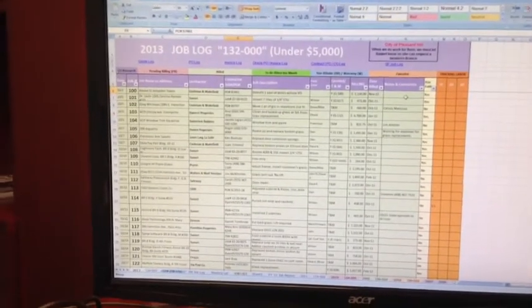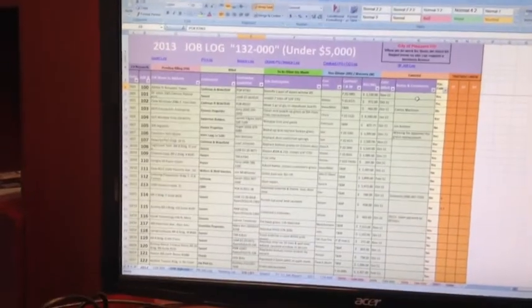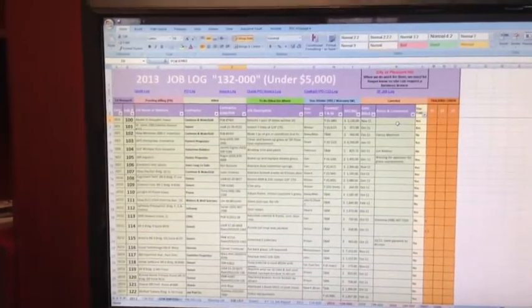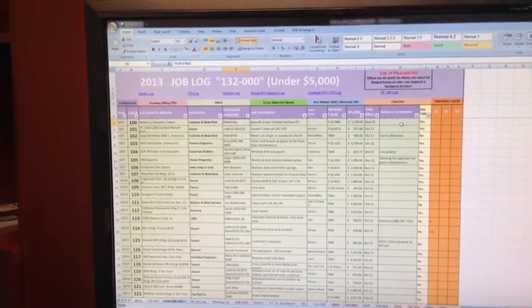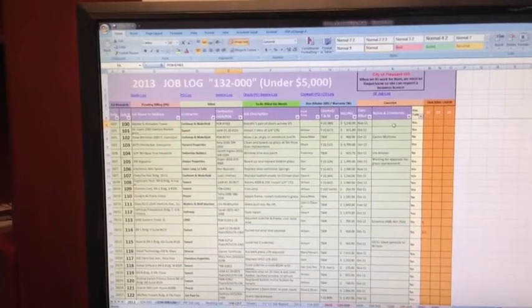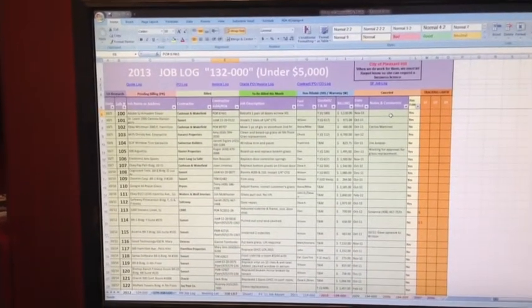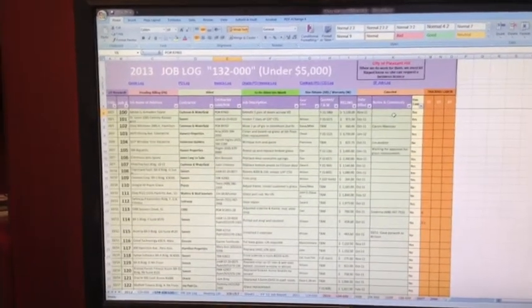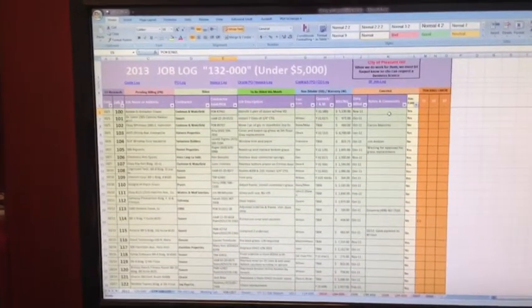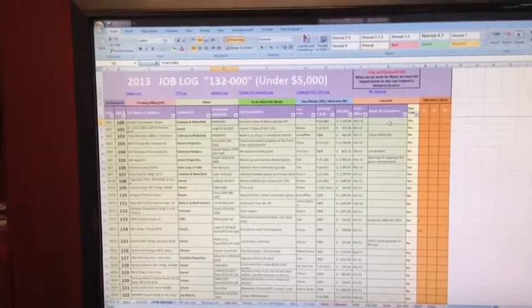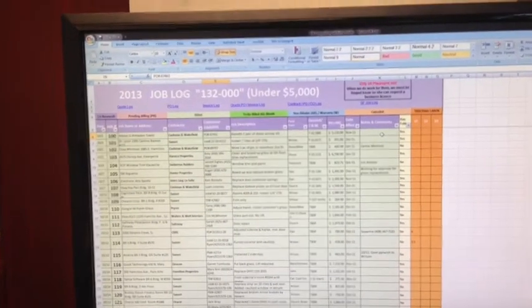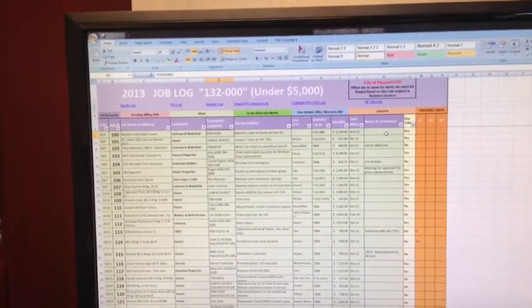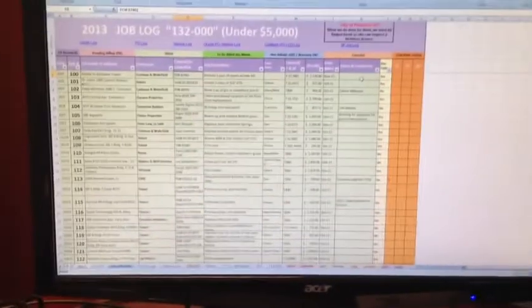Usually because these are single pull-out repairs or door adjustments, we have created a system in which we would go to our accounting department, request a job number, give them the pertinent information such as the proposal and the contractor and the estimate, and then they would set up a job number in this spreadsheet right here.